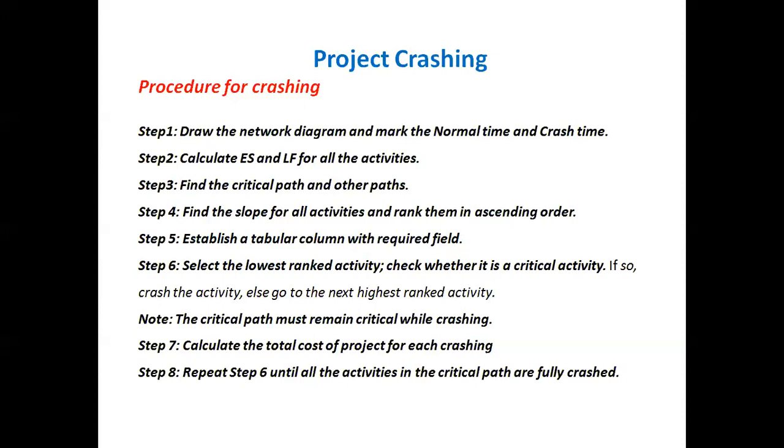Why are we selecting only the critical activities? We already know that the critical activities are the deciders of the project duration. The length of the critical path is the project duration. So if you crash the critical activity, then ultimately it will reduce the project duration. That is why we only crash the critical activities.